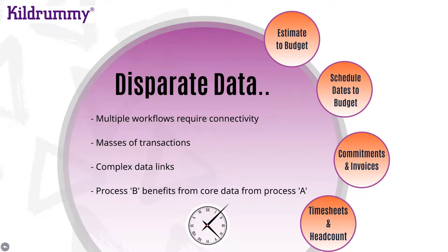So that will include bringing in estimate information, bringing in information from the schedules, so the start and end dates, the progress measurement, etc. Also integrating for commitment information such as purchase orders, subcontracts and contracts, but also the invoices from an actual cost point of view. And in addition to that, we're looking at timesheets, so headcount information, being able to understand who are the people that are working on the project today, who are the people that are going to be working on a project tomorrow, next week, next month, etc., in order that we can create an end-to-end connected environment in order that we can have a more accurate forecast.